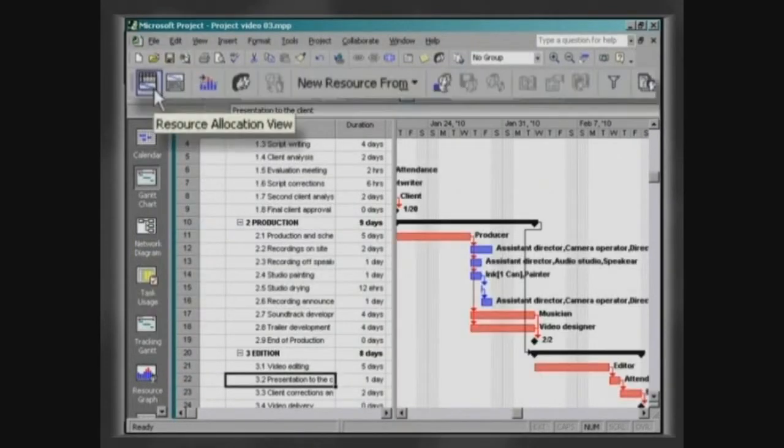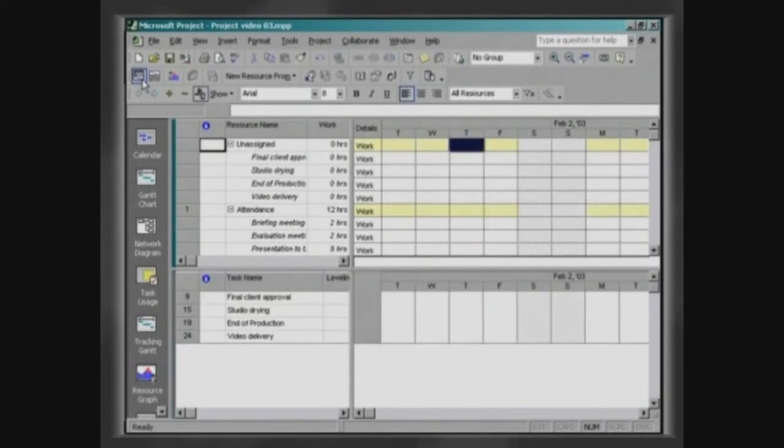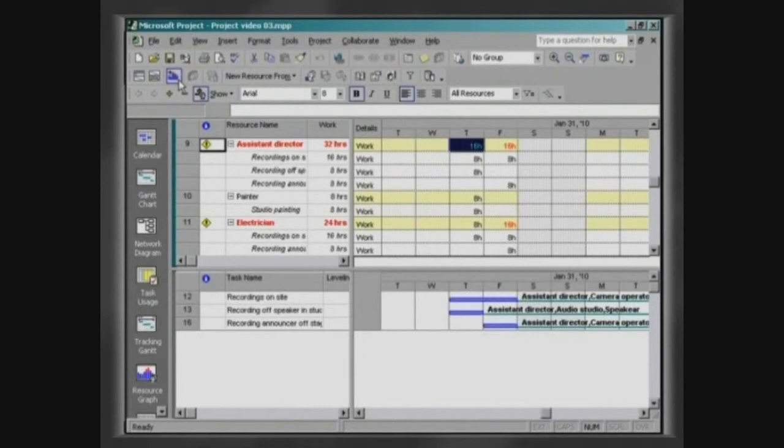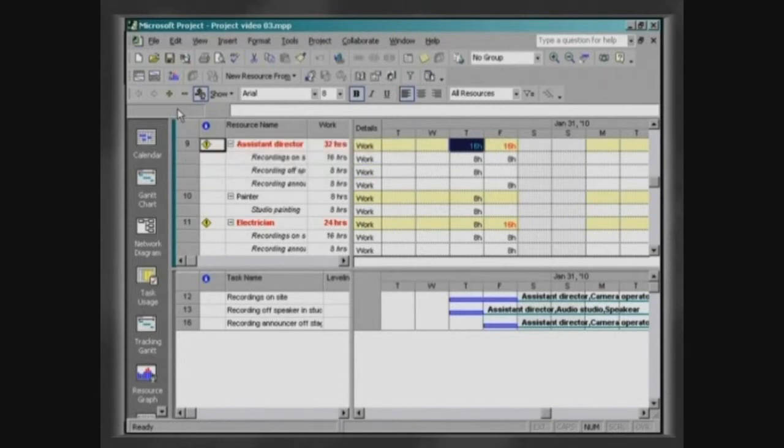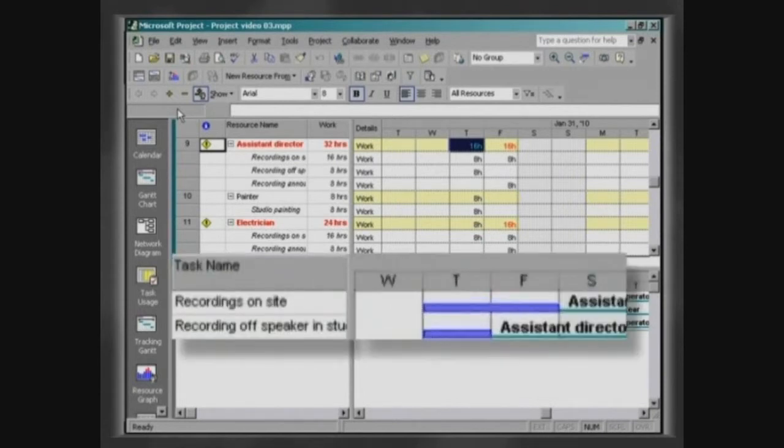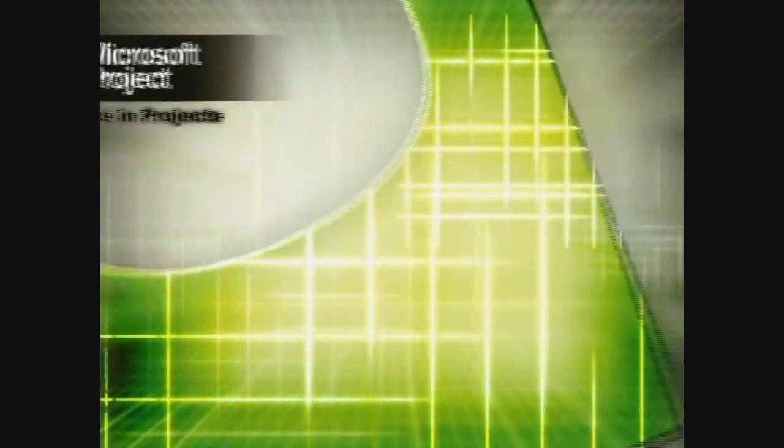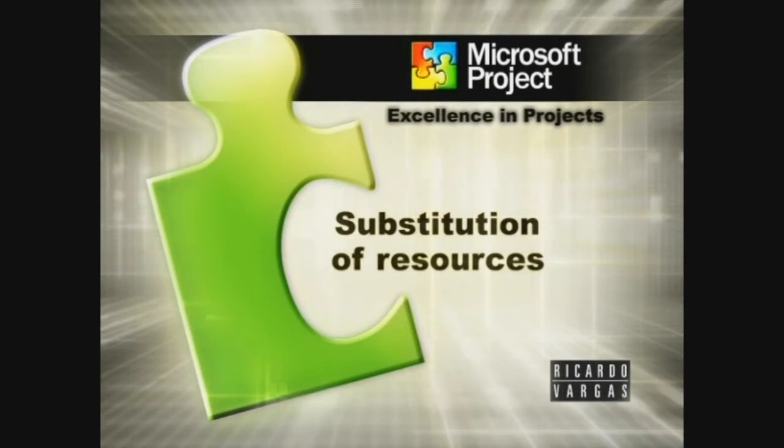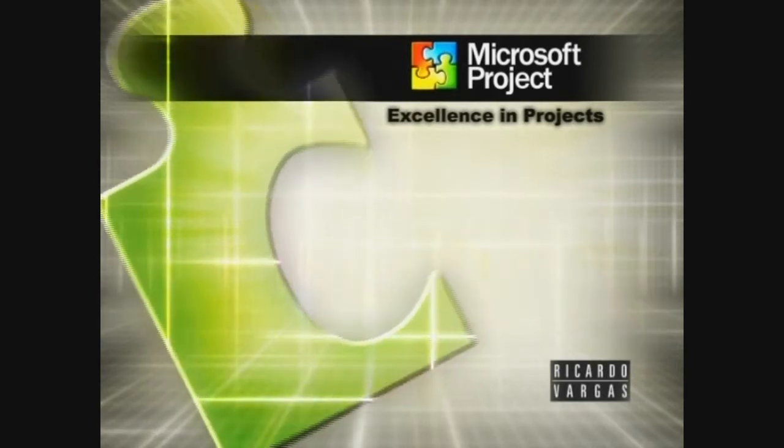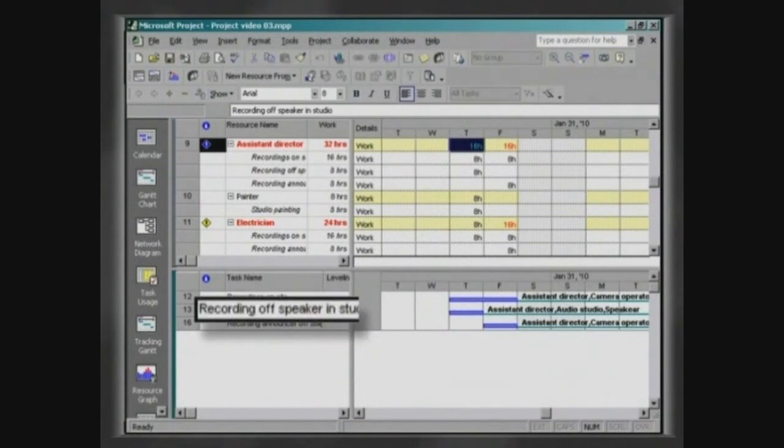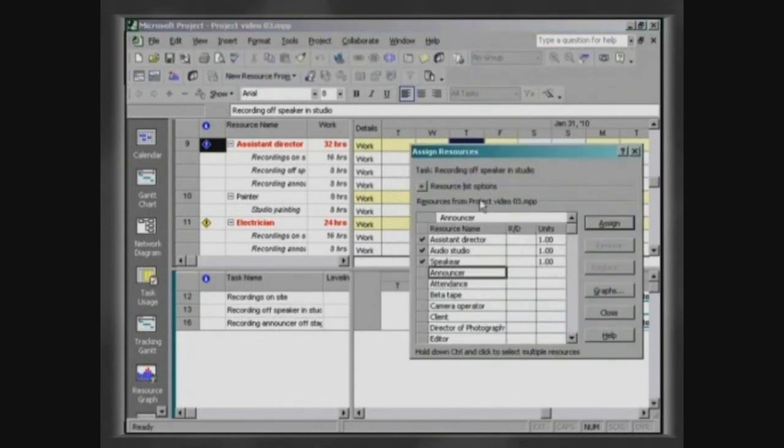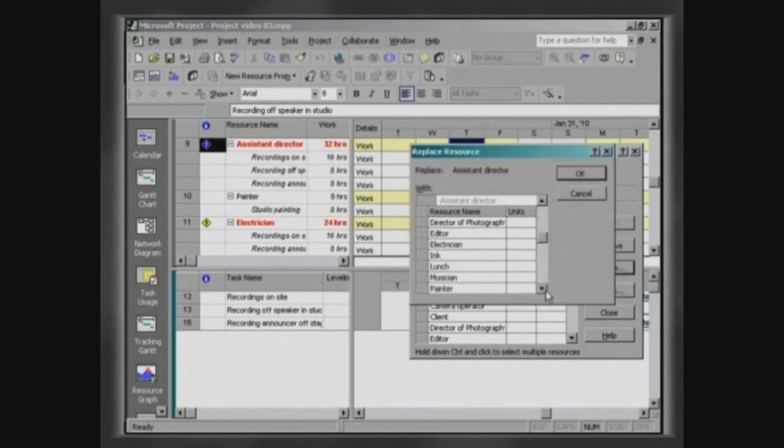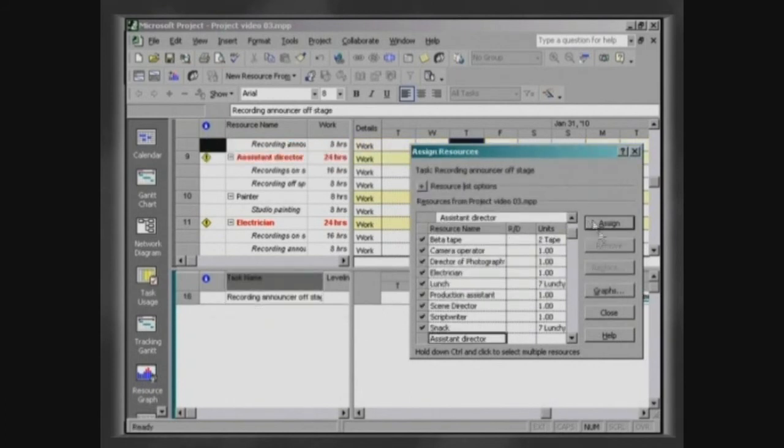Now click on Resource Allocation View and then go to Next Over Allocation. The resource Assistant Director appears in red color. In this way, the project highlights the resources that are superallocated. This resource is attributed to activities Recordings On Site and Recording Off Speaker in Studio, scheduled for the same period. To resolve this problem, select the activity Recording Off Speaker in Studio and click on Assign Resources. Select the resource Assistant Director and click on Replace. Now select Script Writer, click on OK and close the window.